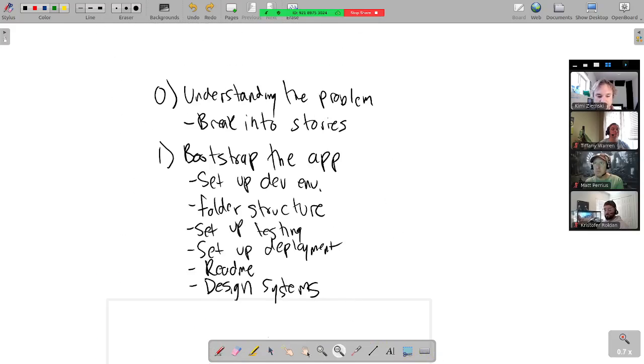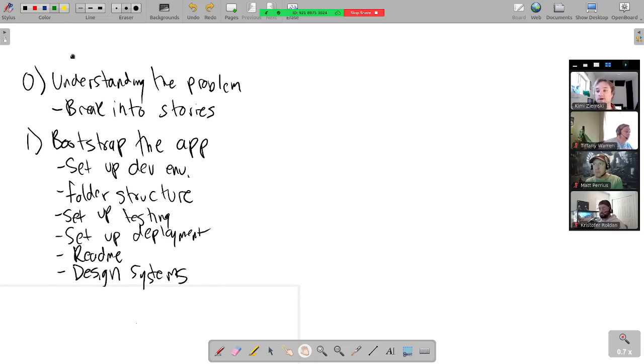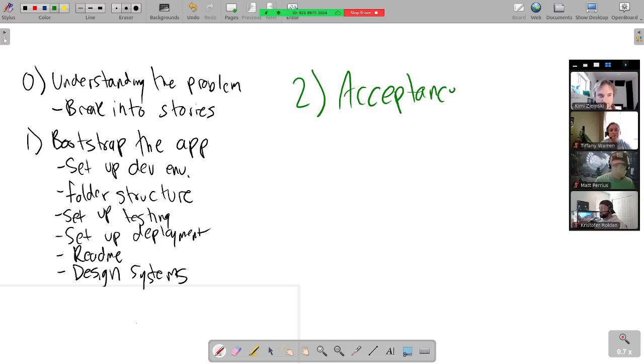Other questions so far? Cool. For each story that you work on, figure out what the acceptance criteria are. This is another thing that keeps you from blowing a story up or gold plating or something like that. How will you know what done is?